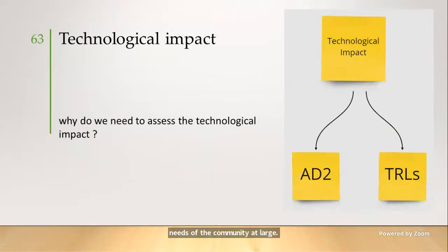Last year, the team didn't have enough time to work on technological and political impacts, so this year we worked on them, starting with technological impact and starting with an important question: why do we need to assess the technological impact? There are many reasons, but the main reasons are the stakeholder expectations, which is a mismatch between stakeholder expectations and developer resources. Also, requirement definition. If the requirements are defined without fully understanding the resources required to accomplish needed technology development, then the program is at risk.